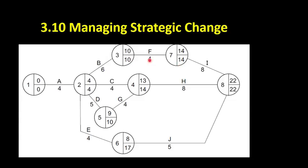Let's just have a look at another example — activity C. The earliest that we could start activity C is week four. The latest that we could finish activity C is week 14. So 14 minus four is 10. Activity C has to start in week 10, but we could start it in week four. So that gives us six weeks to play with between weeks four and week 10 when we could potentially start activity C.